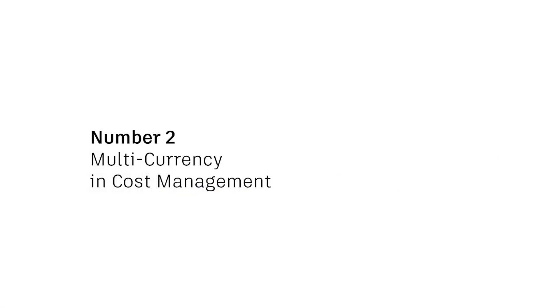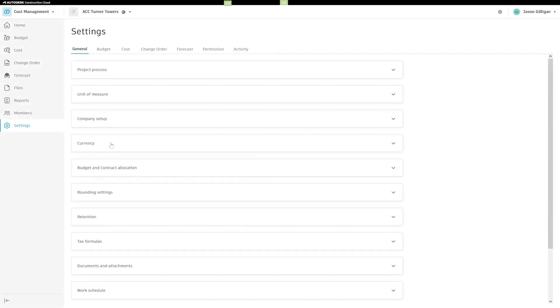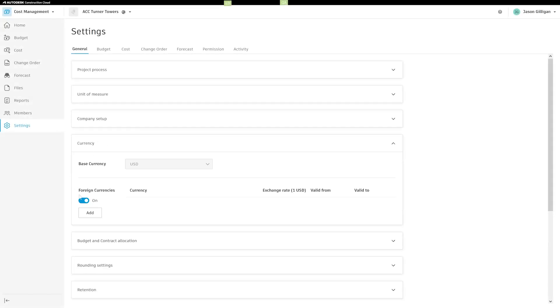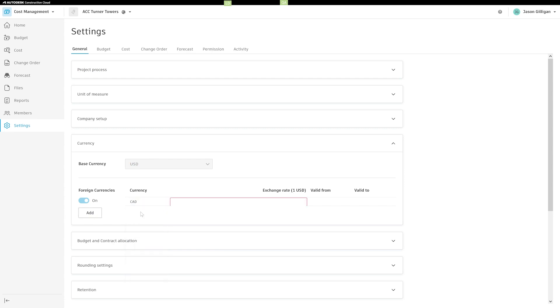Number two, multi-currency for cost management in Autodesk Build. Many companies procure from suppliers and carry out work in foreign countries and as a result must manage cost activities in multiple currencies.